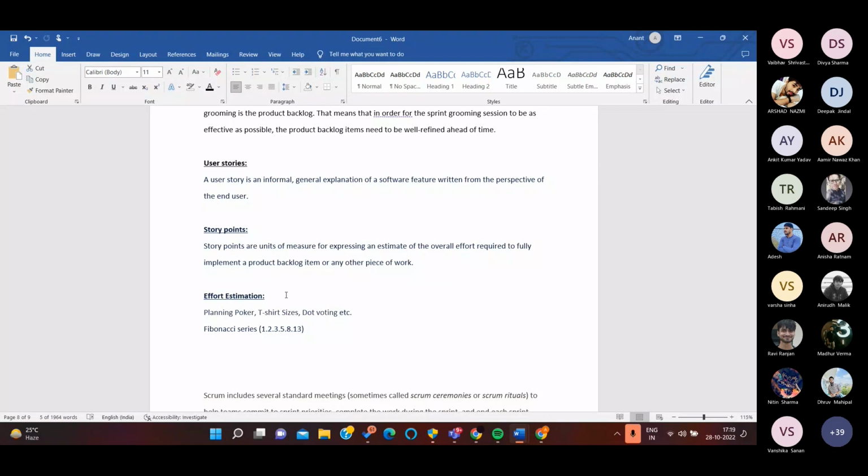And inside that, there would be smaller chunks of work, like the user story, like what exactly the payment module should take from the user. For example, if it needs to enter the debit card details or the credit card details, what should be the name, the CVV number, or the expiry date, the initiation date, all these things. So each one would form an individual user story, like what exactly needs to be done in that particular user story.